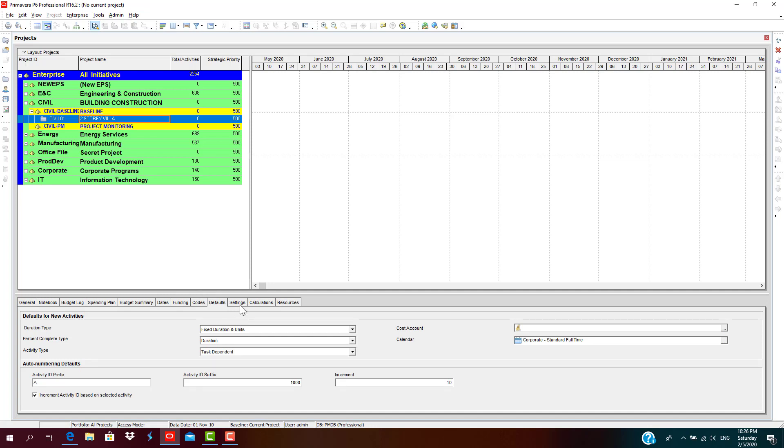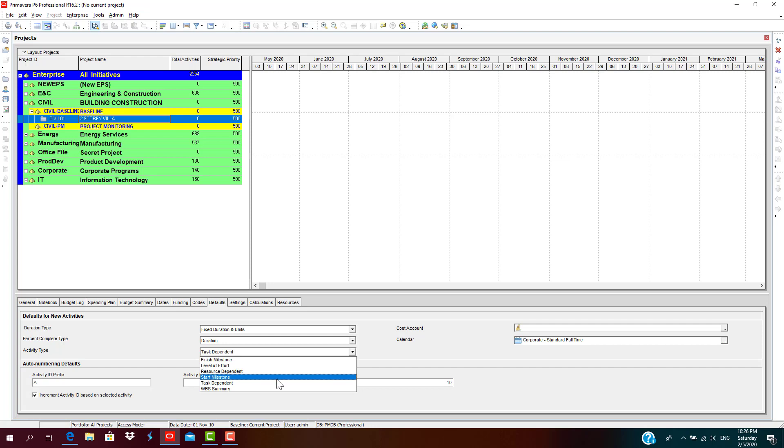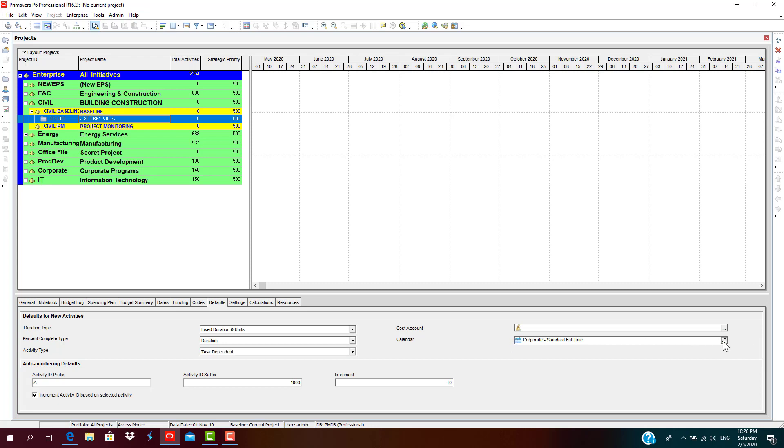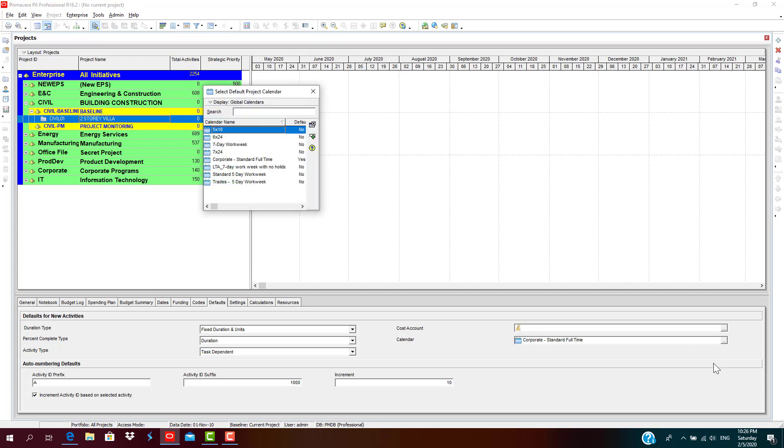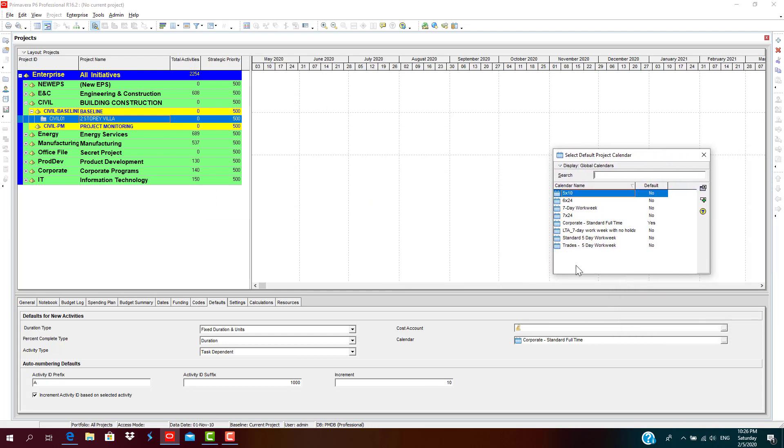What is the default settings for new activities? Duration type: Fixed Duration. And even its percent complete type is Duration Percent Complete. Task dependent activity type is Task Dependent. This is a very critical setting you must check. If you have created a calendar, you can assign this calendar to the project.